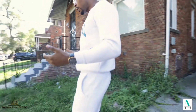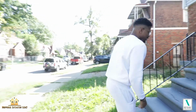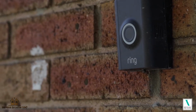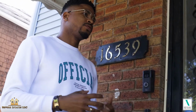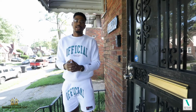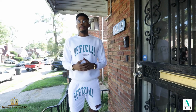Now I'm gonna show y'all another costly mistake that I made, and it wasn't even really added value to the project. It was one of them inexperienced things that I did that I thought was really gonna add value, but it really added none. I was rehabbing this house like it was my own. So for me, this is a Ring camera system. I had an automatic door lock where you can put the keypad code in. But this is all intrinsic value to the property. This does not add value to the appraisal of the home or an inspection. So I spent about $1,000 adding technology to this house that really didn't add any value. I mean, it would add value to the end buyer, but essentially, I didn't have to pay for this added cost. So on a deal like this, if you're flipping any houses, I wouldn't add any special cameras or modifications to it. I would only focus on the things that are gonna add value to the house, which is kitchen, bathrooms, making sure the house looks really nice.